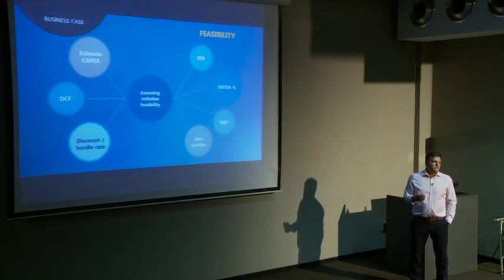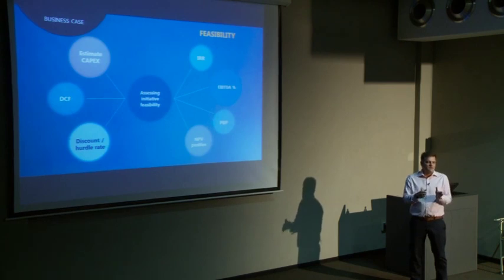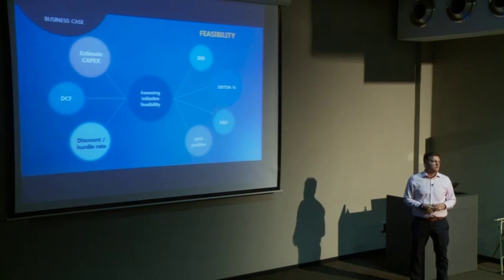The payback period is important because most of our projects, in fact, all of our operational projects, have to have a payback period of less than 5 years. Break even is probably the first year. So there's a lot of pressure on reaching the targeted returns for our projects.